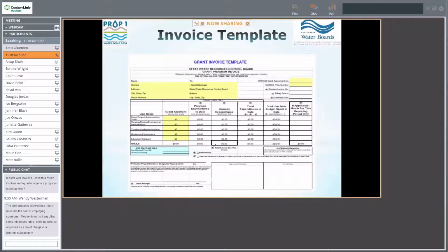So when we asked them how to budget for this, they said to basically include all of those costs. And so, if the hourly rate for somebody was $100, we may end up paying $250 for an hour of that employee's time. I'm not sure if that's actually going to be allowable based on what we've just seen you talk about with the certification of employees and their hourly rates and not having overhead or indirect costs.